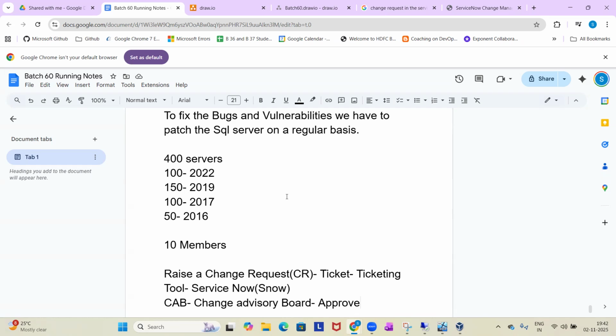So whatever it is impacting or trying to impact the SQL server or the objects of the database, for that you have to raise a change request and you have to get the proper approvals. So once your application owner agreed or approved, then you have to raise a change request. Then CAB people also have to agree. So be ready with your answers and all.